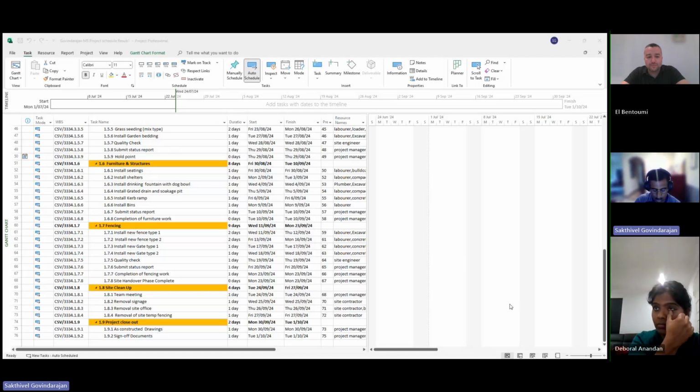The fence is 2.5 mm thickness, chain mesh type, hinged and linked with the other posts. These are the two resources I'm using, taking careful consideration when preparing the planning document. When I do the scheduling, every day I put 8 to 4, so another 2 hours is allowable. If you get into a backlog, I put additional resource to work overtime to complete the task on time. I excluded Saturday and Sunday.